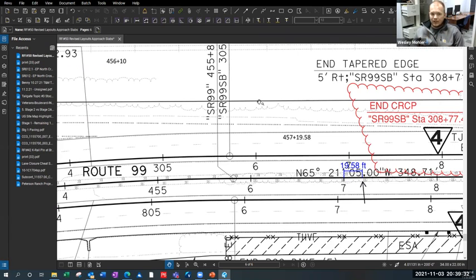Like if you were doing a commercial building, you had a pour for a foundation. That's a very tight time window. So that's the best example comparison I can give you. That concrete cures. So you have to have that thing done by the end of the shift, or else you got to rip that whole thing out. And that's a lot of money wasted. So with civil, it's similar to that. But maybe more often than not, that's the condition. Everything's way more time sensitive, each shift, each day.